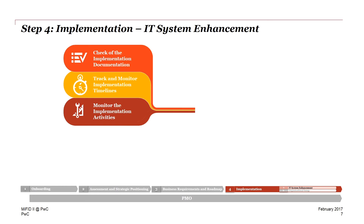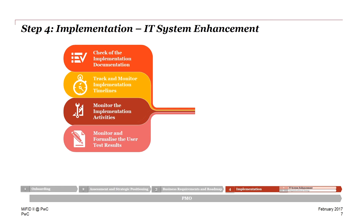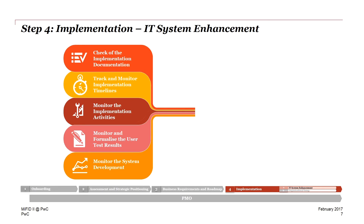It is also necessary to monitor the implementation activities from the business point of view. Our experience has shown that as soon as the IT starts to implement the business requirements, we need to check whether all business activities are completely included in the IT implementation and whether the IT department has fully understood the business changes. After implementation, it is also important to test the IT systems. Please keep in mind that it is essential to develop test cases and a milestone plan before testing. Even after road testing, documenting the entire development should still be monitored. Key deliverables of this phase are proper documentation and meaningful reporting on IT implementation and user acceptance testing.